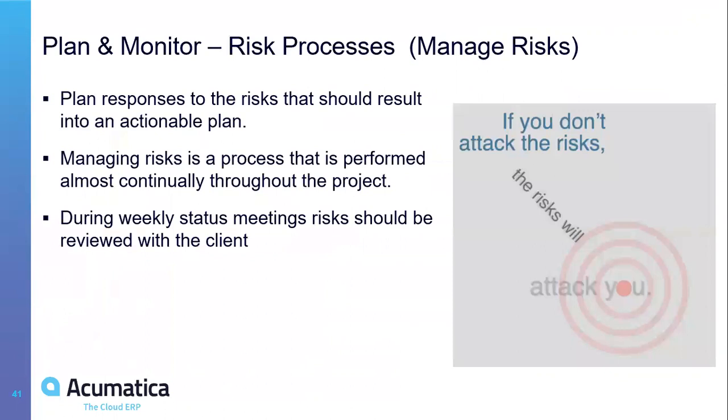So this is what you should do if you identify some risk. To point number one, what I call my plan B. If this risk will happen, what can I do if my finance consultant is getting sick? What are my options? How can I move maybe meetings around or trainings around? Do I have a backup in the office that may be able to help me? Do I maybe have the knowledge that I can jump in? That's the easiest solution there.